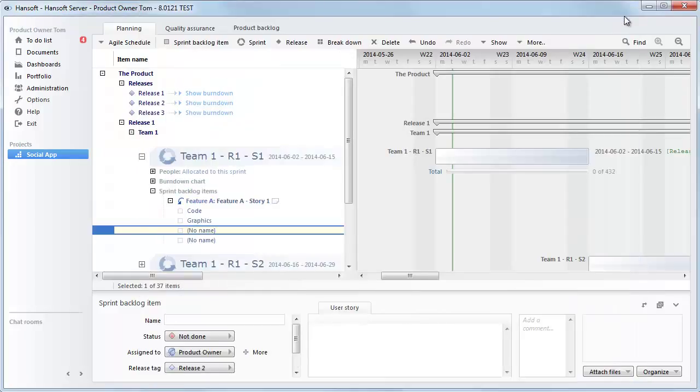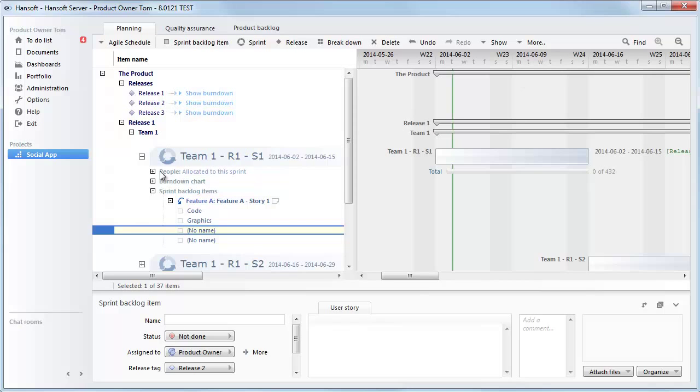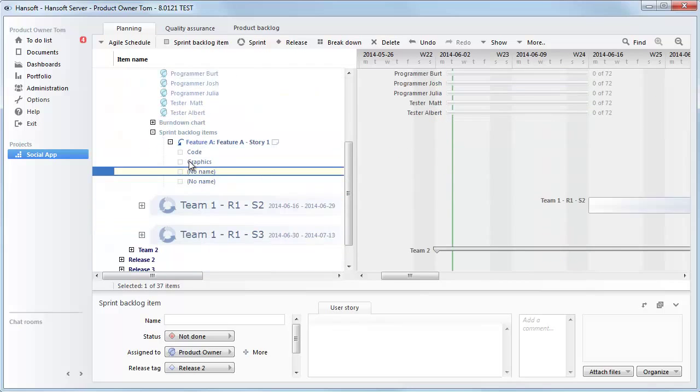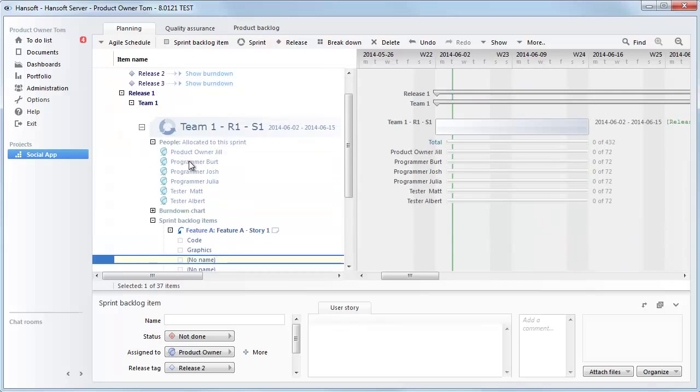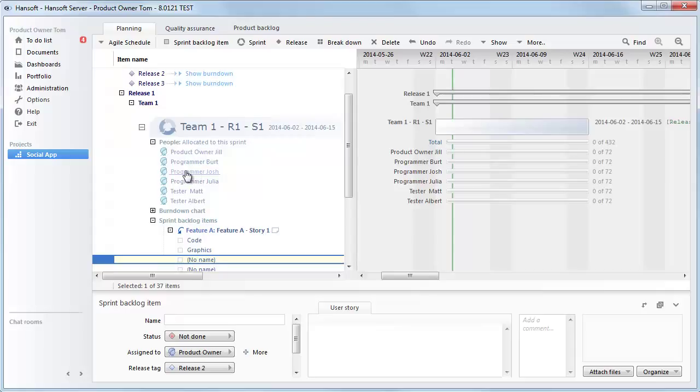The fifth and final advice I'm going to give you is to not run everyone in the same sprint. It's quite common that I see that all the team members are in the same sprint. This means that it's very hard to see what's going on because there's so much going on. And the usual case why people have everyone in one sprint is because the organization is too intertwined. There's so many dependencies between people. That is the problem to start resolving instead of putting everyone in one sprint.